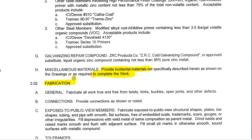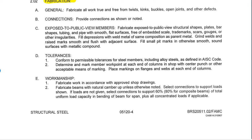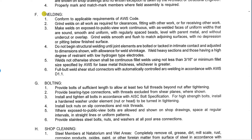Next we get into fabrication, which tells us exactly how to put things together. Where the specifications are silent, the AISC code of standard practice comes into play. Looking at fabrication, it talks about tolerances, and in this particular case, how to treat steel that's in public view, workmanship, and things like that. It also covers how the contractor is supposed to do welding, bolting, and shop cleaning. It's really important to read through this carefully to make sure there's nothing more detailed than what you'd get in standard practice, because that could end up affecting cost and schedule.